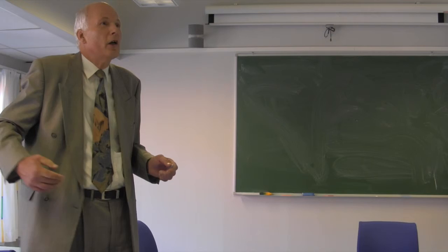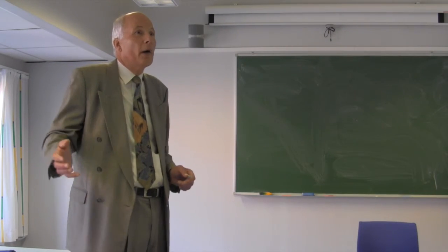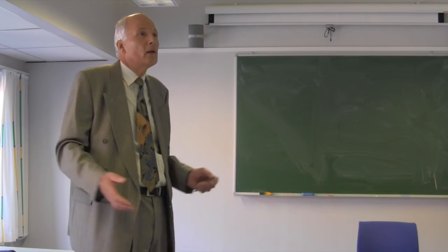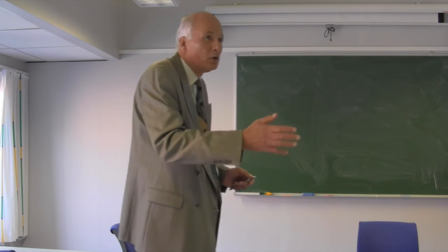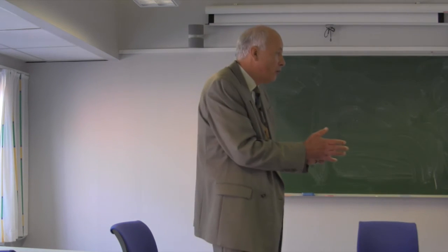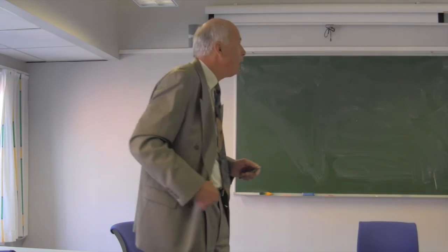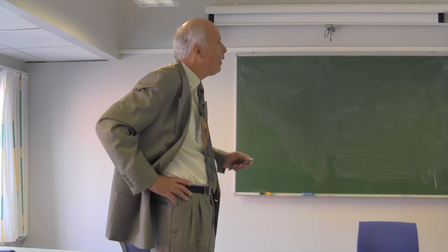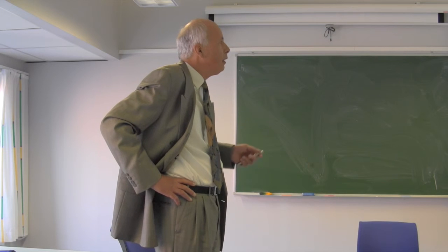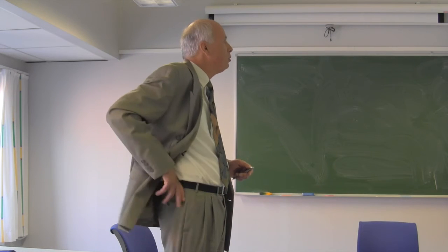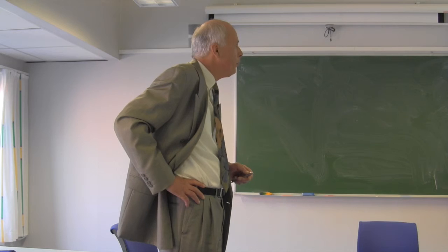You can want to have a change, but all the people who have to do it are occupied with a higher priority. It makes no sense to set a short date or put the activity close. All these things have to be in place. So the planning is a separate thing that has to happen.